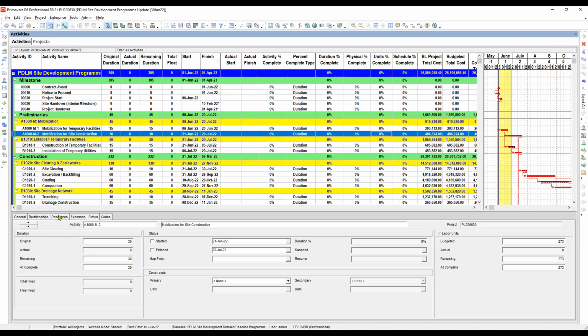Actually, in my own understanding, in this type of activity percent complete, we will be using this as the activity percent complete. I'm not sure if this is really reliable, because it apparently assumes that the resource units assigned have the efficiency to achieve the work accurately as planned, which for me has a very small chance in reality if we use this units percent complete as our activity percent complete.